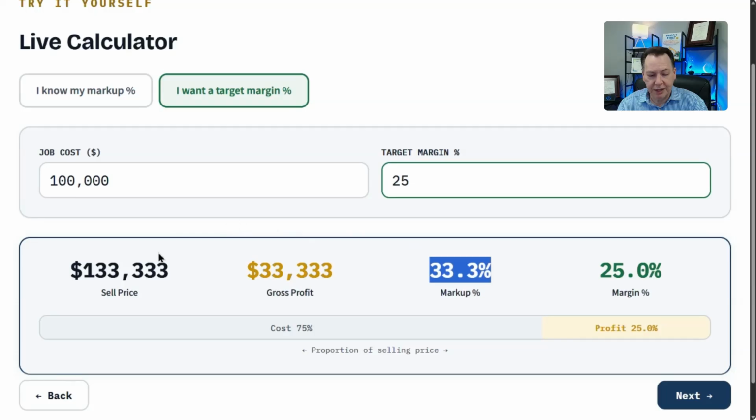Yeah, and I get it. So it's dividing that cost by the markup percentage or the margin that you're trying to get. If you know these calculations that we'll walk through in a minute, at a 25% margin, you need to mark it up by 33%. There's some people on YouTube saying you need to mark up everything 50%. And everybody's like, I can never make that profit. Nobody's going to buy from me. But if you're actually trying to hit a certain level of profitability, you need to know these numbers. So let me stop here and see if I'm making some semblance of sense here.